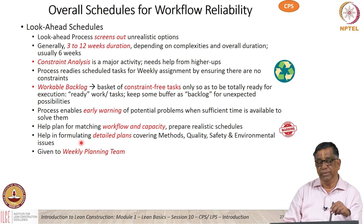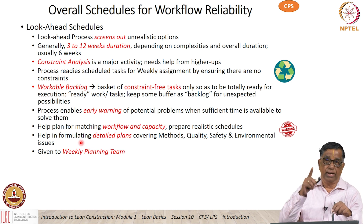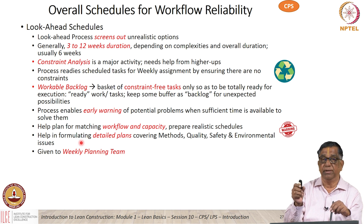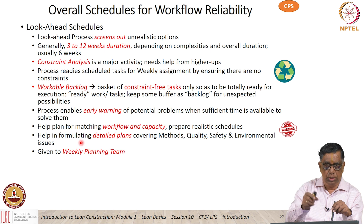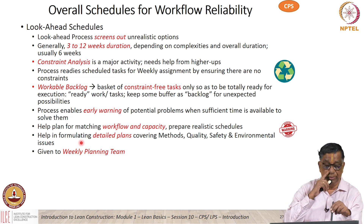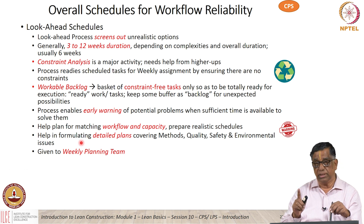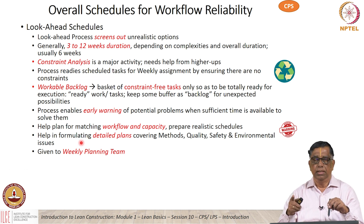By the time we come to the weekly planning, remember we have already identified the sequence and broadly identified the batch size — meaning how much quantity can be taken up in a given period of time, daily or weekly. In the look-ahead window, we identify so much work to be done in a batch on a particular day or week. So we have done the sequencing, the batch size, the broad methods are identified, and the resources are taken care of in the constraint planning. When we come to the sixth week, for example, I have analyzed that sixth week's work in the previous five weeks.